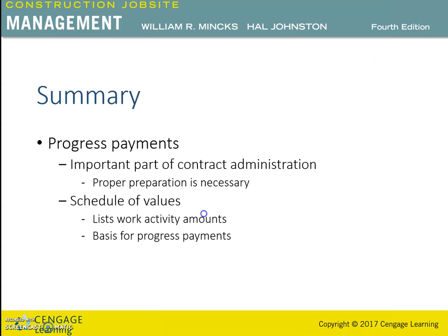Summary. The progress payments are an important part of the contract administration for the contractor. Proper preparation of the information necessary for payment processing can help the contractor financially complete the project. So at the start of the project, the contractor prepares the schedule of values and a cash flow projection.